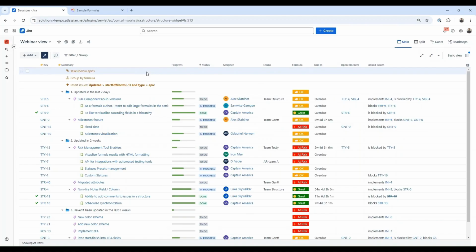In my case, I assume that I have some child items with status in progress or maybe even done, with the parent having status to do at the same time, which indicates I might have some misalignment with the parent-child statuses. To highlight the problem, I will filter out all the items except for the epics with status to-do and their children having status in progress.